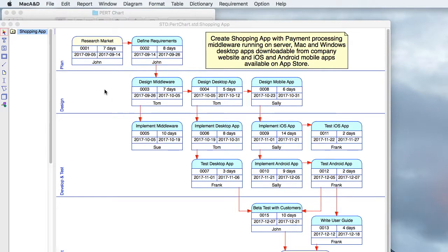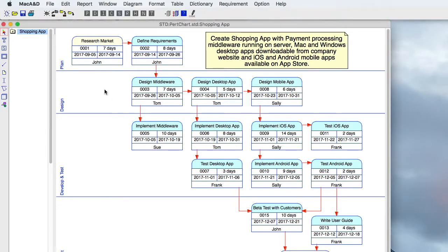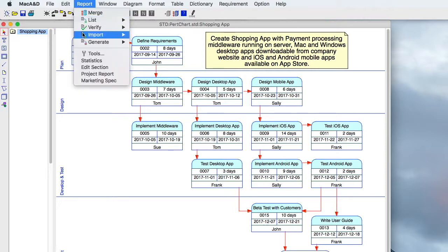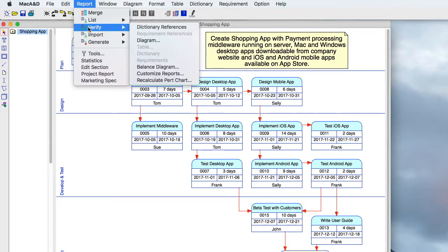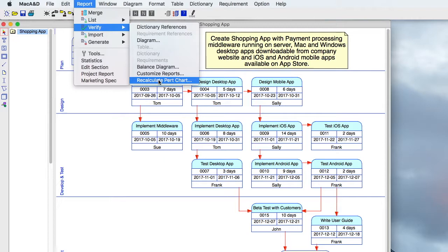During an ongoing project, things can be pretty dynamic. Sometimes tasks take longer than expected, an employee gets sick, takes a vacation, or even quits. And so you'll have to make some adjustments. And there's a command that allows you to recalculate your PERT chart, readjusting the dates, identifying and helping you to resolve any scheduling issues.